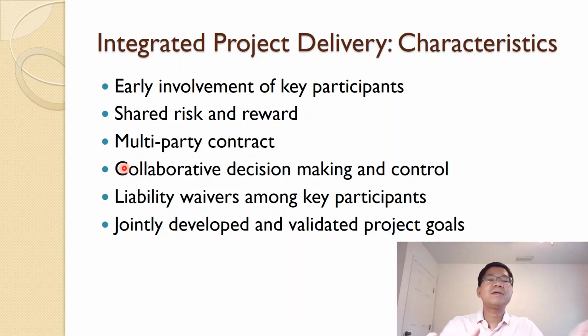In other project delivery methods, you have to take liability, but in this case, someone advises and is involved, and because risk and reward are shared, you have more motivation to share your ideas to ensure the project's success, because the project's success is everyone's success. But I need to waive my liability to do something, and that is the key for integrated project delivery. And the last one is jointly developed and validated project goals with multiple parties involved. So those are the characteristics of IPD.